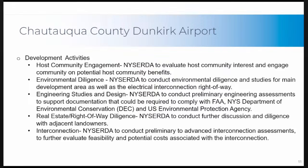In terms of timeline, one of the changes that the NYISO has made in the past year regarding large-scale renewable energy projects is that they moved away from a rolling acceptance of interconnection applications. Now they are moving to an 18-month clustered study cycle process. This particular clustered cycle deadline is starting in July 2024.